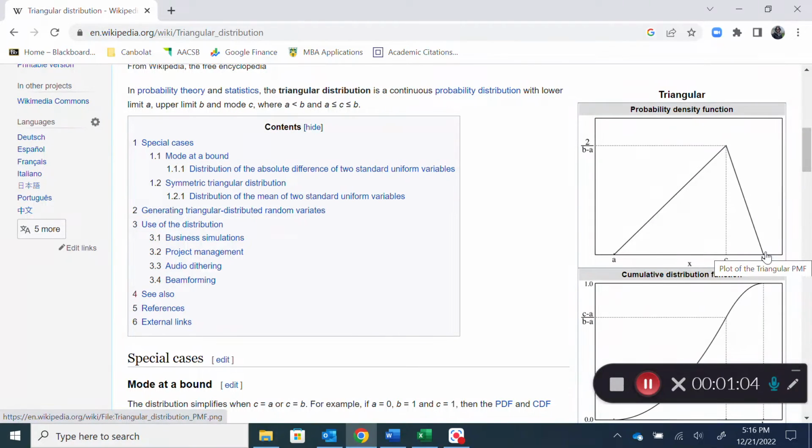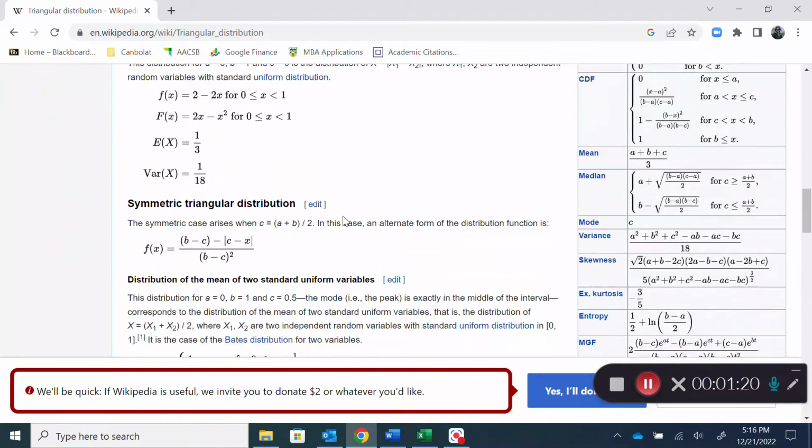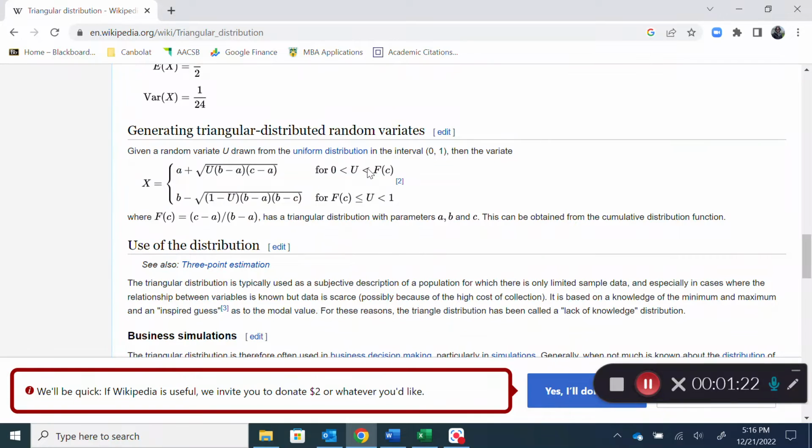If you represent the random variables of these durations with a normal distribution, you are not going to be able to create a non-symmetrical distribution. You may have to use a beta distribution, and that's another alternative, but the easiest distribution is the triangular distribution. So how are we going to create random variables for every activity? If we do that for a large number of values and simulate, we would have a better understanding of the project duration.